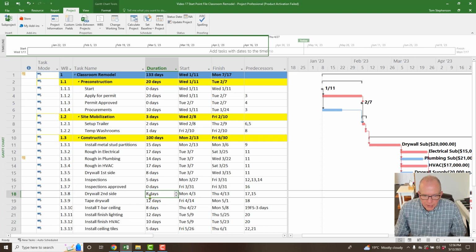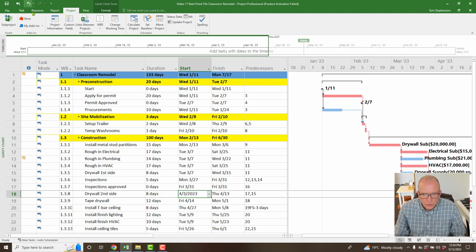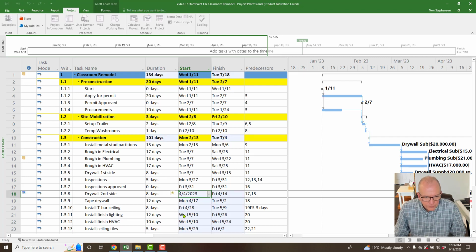So let's say you're working in this, and I've talked about this before. So I'm going to go in and I'm going to pick a date from here. So I just made that April 4th. Now, I don't know if you noticed, but when I did that, everything that was red behind here has disappeared. Right? So I'm just going to click undo just to show you. Undo. No constraint. I went in there and I picked April 4th. And you see, everything, it's gone.